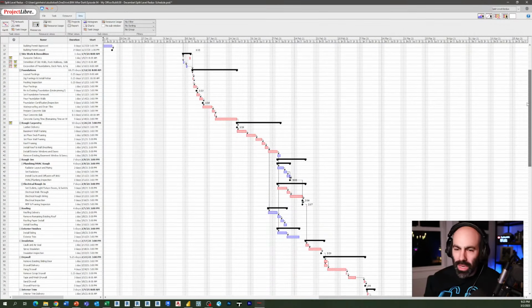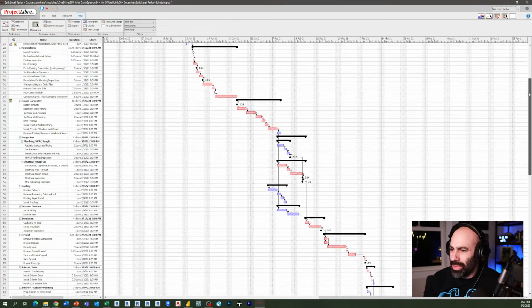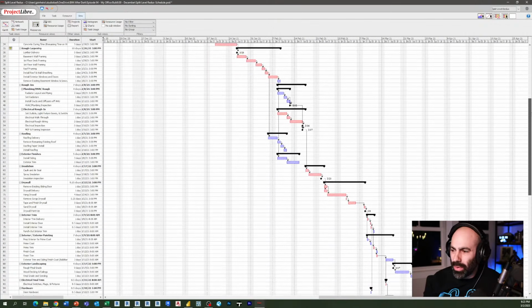And I was lucky enough, shout out to my buddy Eric Murray, who helped me out on some of these durations based on a project he just finished, and then reaching out to some subcontractors to get durations. But I kind of mocked out a schedule beforehand for various different reasons. First of all, trying to make sure that we'll finish on time, but also for the sake of financing and so on and so forth. And for the most part, these durations ended up being pretty dead on.